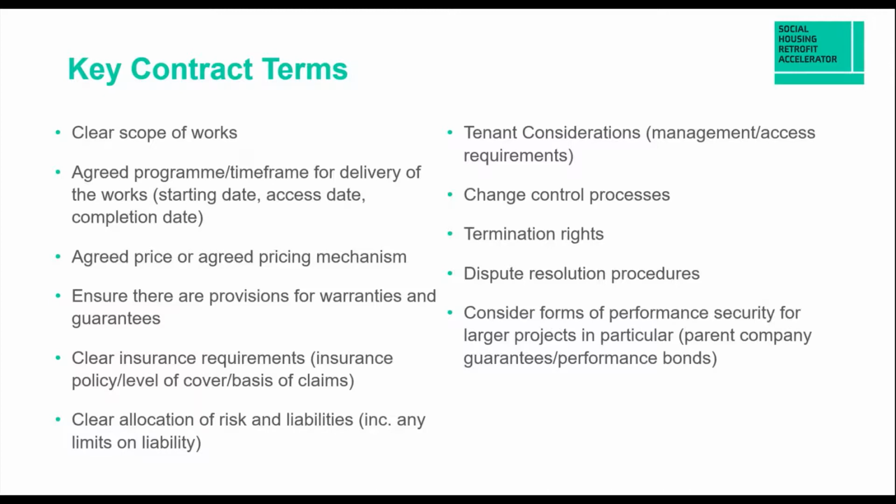The next one, ensuring that there are provisions for warranties and guarantees within the contract. Most standard form construction contracts will have options for warranties and guarantees. Subcontractor and subconsultant warranties are very important, particularly in the event that the contractor goes insolvent. This means that the client would have a direct contractual relationship with that subcontractor or subconsultant who did the work. So if there's any issues or it's faulty, they have that direct recourse.